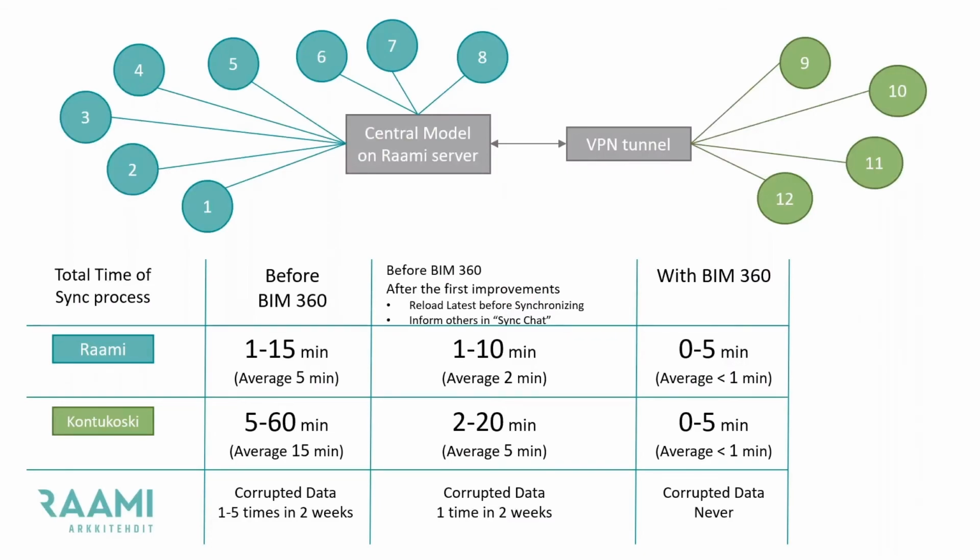And we saw that the benefit in total was, can you change the slide? So we calculated that we saved about 5 work days per month in this biggest project, so the benefits of this are like 2 or 3 times the price of BIM 360.